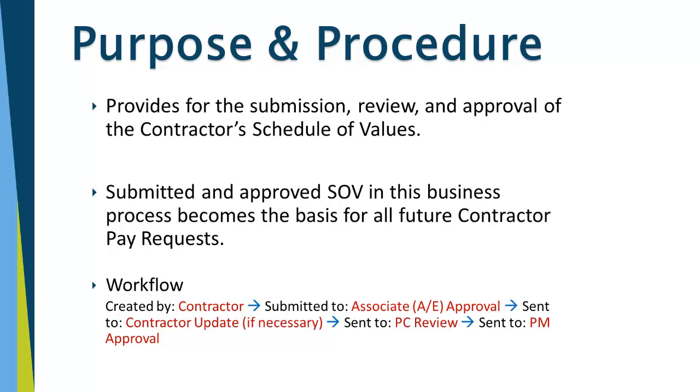For the workflow, it's created by the contractor, submitted to the architect for approval. It can go back to the contractor for update if necessary, then goes to the project coordinator for review, and then sent to the project manager for final approval.